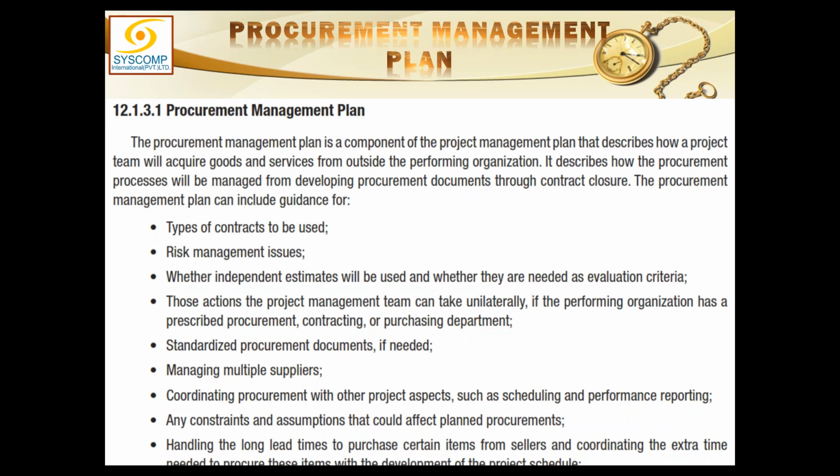And if there are any constraints and assumptions that could affect the planned procurements, that should be listed down in the procurement management plan, and handling the long lead times to purchase certain items from sellers and coordinating the extra time needed to procure these items with the development of the project schedule. Like you see, there are sometimes some equipment which has to be imported and it takes as long as 6 to 9 months or a year. So in that case, we would give a lead time for those purchases to occur.